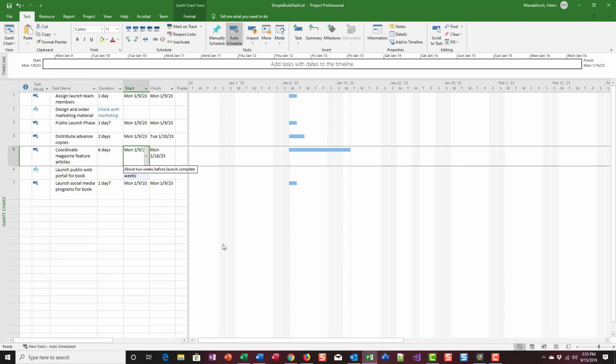So we're going to go to page 74, and we're going to start to enter milestones. Remember, milestones are those touch points that we can review the project and make sure that we're at a good spot. So in this scenario, you learned that all planning activities must be completed before the book launch. You want this requirement to have visibility in the plan. So we're going to insert a new milestone task named Planning Complete so that it appears above task 3.